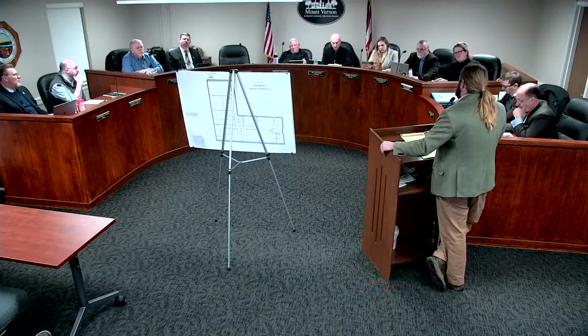What about the infrastructure under Edgewood Road? Well, the gas company has a plan to completely replace their gas line, which is located in the ditch on the east side of the road. They have not pulled a permit for that. The water line is in poor condition, sanitary is in poor condition, and the storm sewer is in failure.